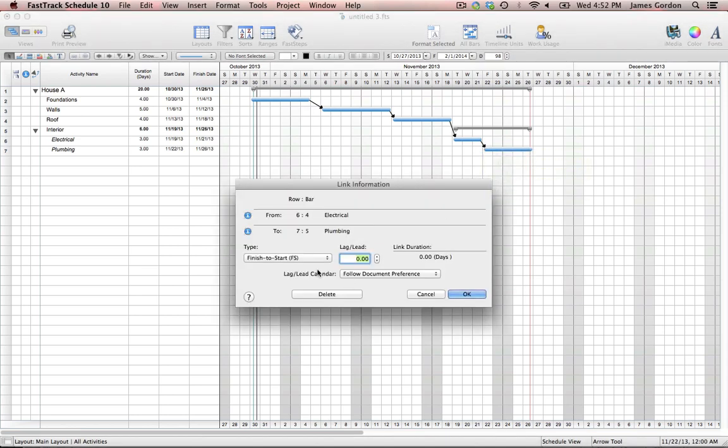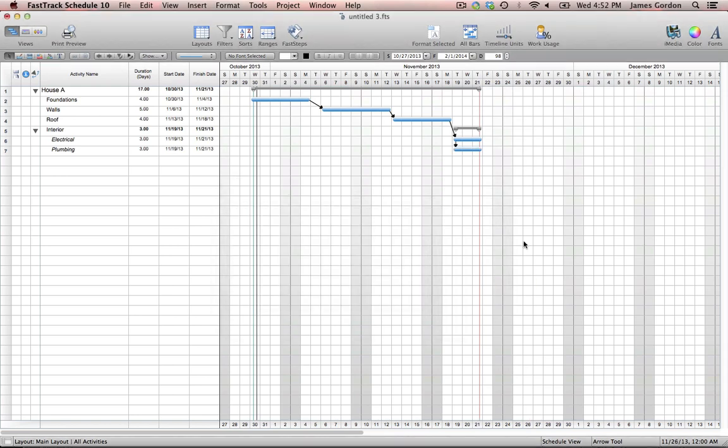Another thing we can do is change our link types. Say our electrical and plumbing should be started on the same day as soon as we get our roof finished — what we have to do is choose the start-to-start link type, and now those tasks start on the same day. Now that we have all our links and dependencies set up, this is really where FastTrack Schedule becomes alive. It'll allow you to move around the tasks in your project and everything else that's linked behind it will get moved around as well. This is really useful for what-if scenarios — if you see a delay coming up in your project, you can see how that's going to affect you time-wise, budget-wise, and resource-wise.